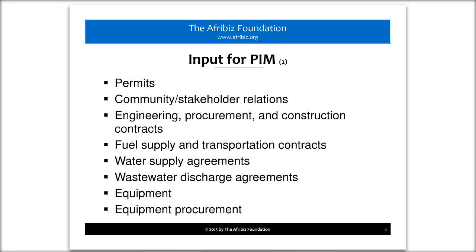If you're in a wetland, you're going to need wetland permits. And again, some countries may not actually have this worked out in a very methodical way. But, for example, they might be in agreement with international agreements that essentially say that they're going to protect the environment.